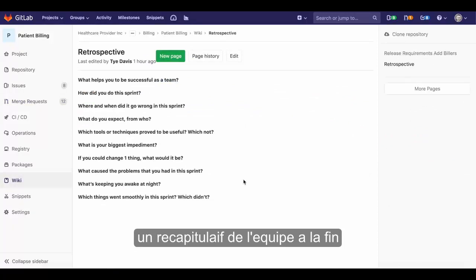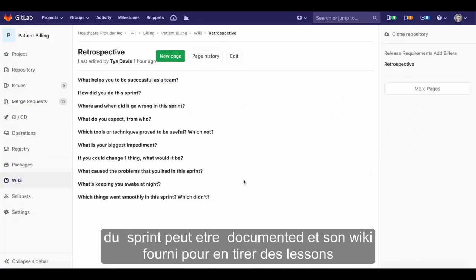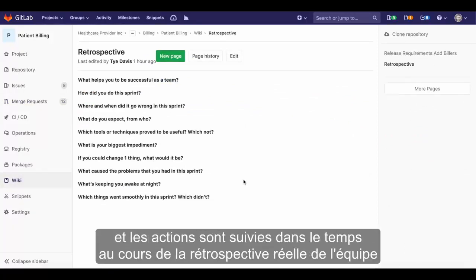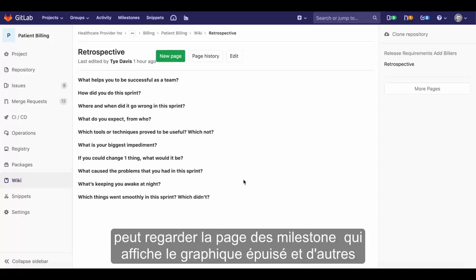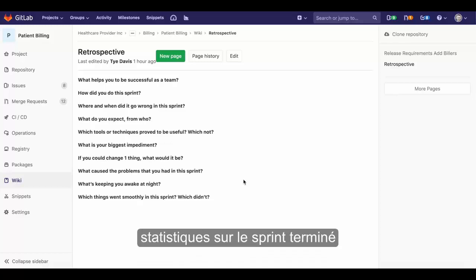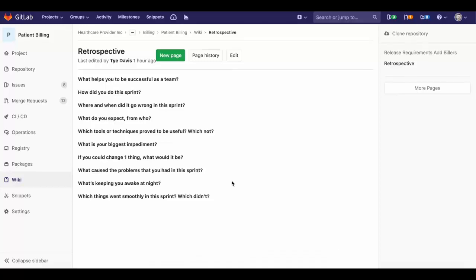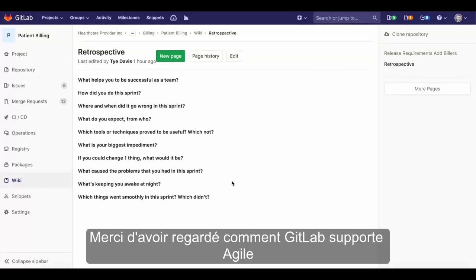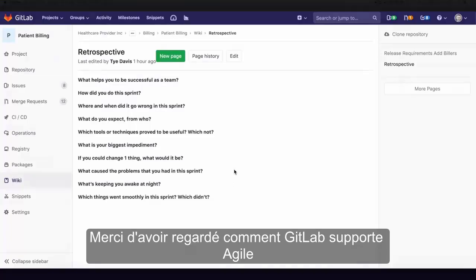A team retrospective at the end of the sprint can be documented in the provided wiki so that lessons learned and action items are tracked over time. During the actual retrospective, the team can look at the milestones page, which displays the burndown chart and other statistics on the completed sprint. Thanks for watching how GitLab supports Agile.